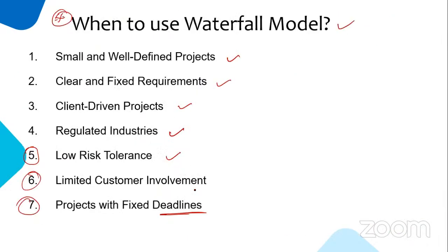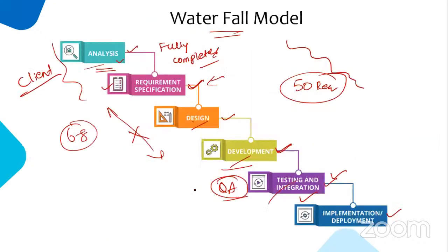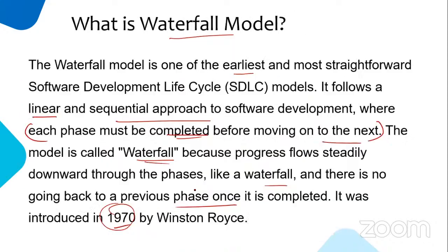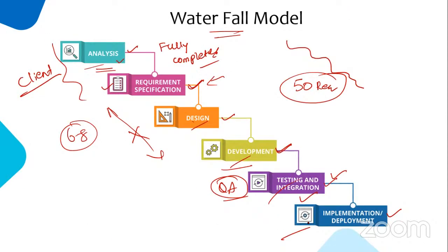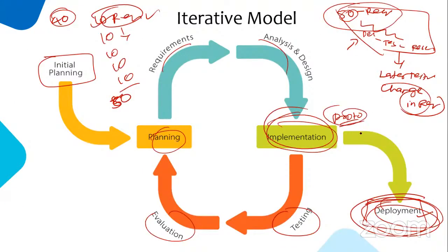What we have seen, the first one is the waterfall model. The two problems with the waterfall model are, one is QA coming at the later part. Due to that, the cost of fix is very high, and you are going to see the product after many months. So this is the main problem. Now, after many months and requirement changing cannot be done, three main problems. That two problems are resolved now. Now you can keep changing the requirement in the iterative model. You can see the prototype, but you have to wait until all the product is live to all the customers.